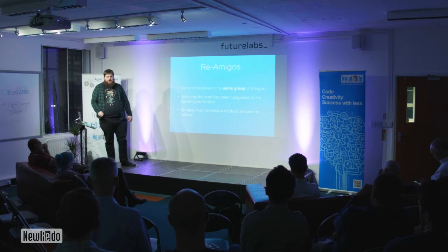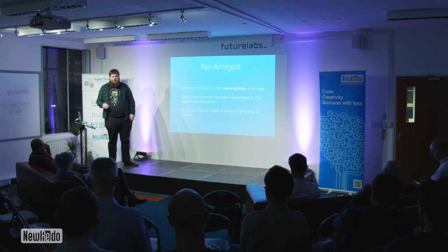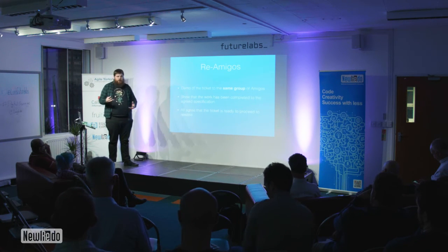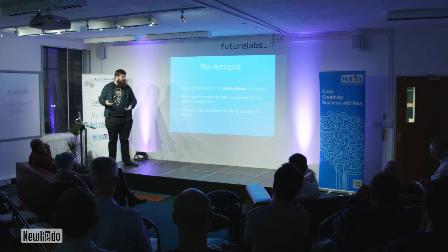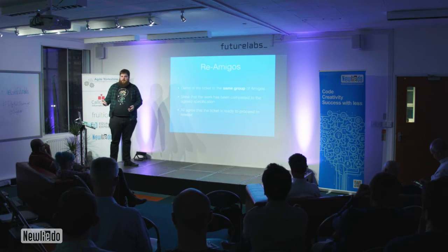And then re-Amigos, so demoing things to ideally the group so that everyone that was aware of this piece of work can actually come back and say, yeah, that's what I expected it to be. Yeah, that does everything I expected. All the tests pass. It's ready to ship.